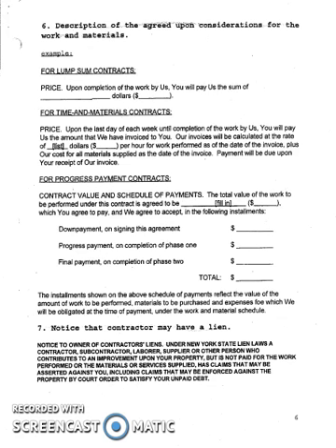So lump sum is intended to be a one-time payment. So it may be a smaller project where you can get by with one payment at the end of the project. Time and materials, on the other hand, is where you bill the owner for your time, whatever it costs, and then whatever materials that you use, and then they pay you accordingly.